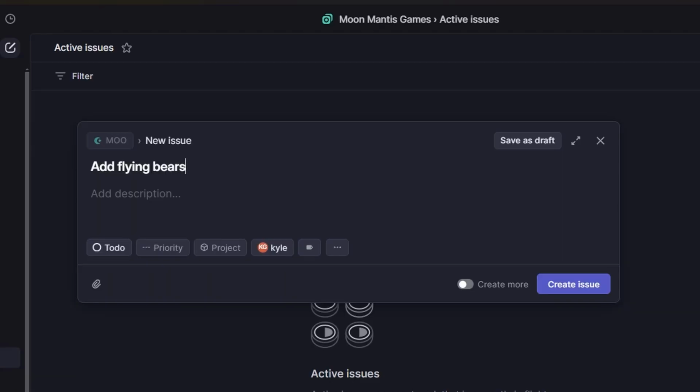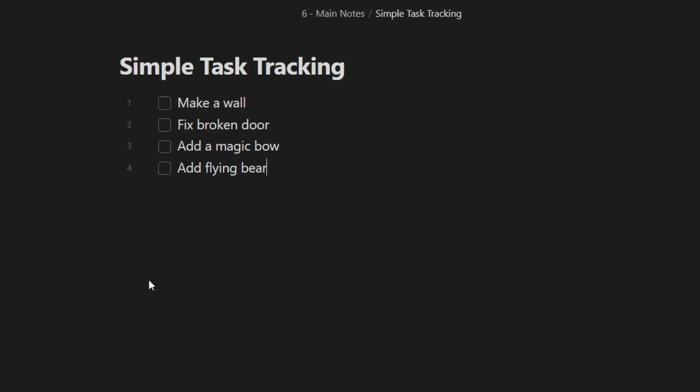The first thing that you start out with is just to track it. This assumes that you have some kind of project tracking. If you don't, I really suggest you do that. It doesn't have to be anything complex. You don't have to have a massive overblown process to do this. You can really, if you want to, keep track of it in a text file. When you recognize there's a new thing coming in, maybe it's a new idea, maybe it's a piece of feedback, just throw that in your backlog of work. That just captures the idea in that moment and tosses it in there so you can review it later.